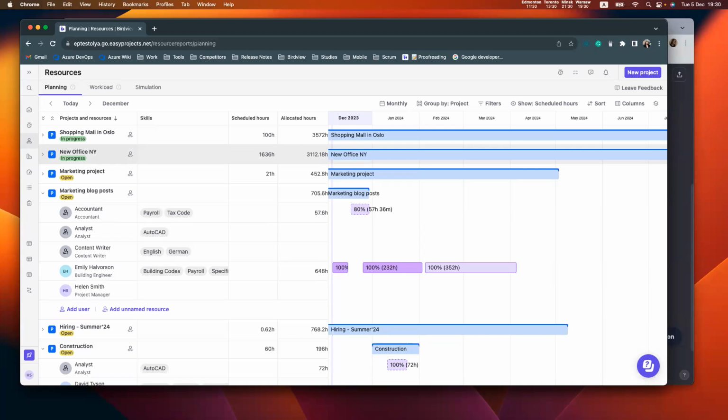I might say that planning works perfectly at the initial stages of the project, but you can also maintain these allocations during the project. So for example, other project managers or resource managers can observe that this resource is booked, this resource is working on this project, so I'm not able to take this resource. So allocated hours, I might say, can be just an approximate estimate, while scheduled hours display specific estimates.